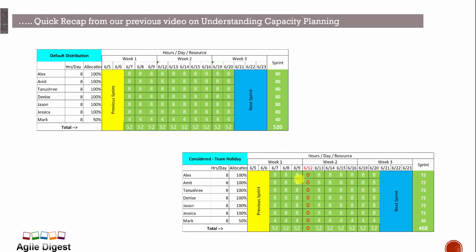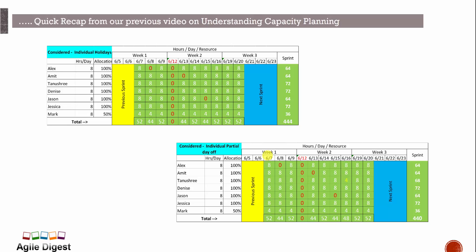Now assuming 12th of June is a company holiday — a team holiday — everyone will not be working, so we calculate that factor into capacity. The next factor is individual holidays or planned vacations: Alex is on vacation on the 8th, Amit on the 13th, and Jason on the 15th. Also, Tanushri is taking a half day off on the 16th of June, working four hours instead of eight.